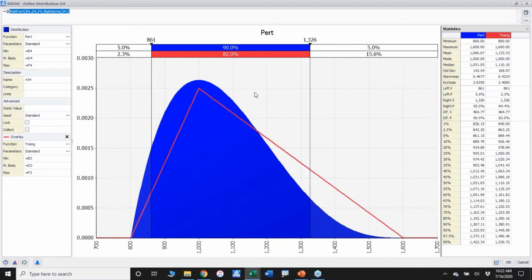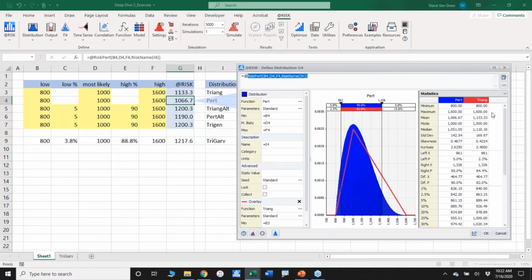And I hope I explained that well, because to me, this is really a fundamental difference between the two distributions. Choosing the PERT over the triangular tells the expert, I believe you, I'm going to put more probability around the most likely, and I'm also not going to exaggerate one or potentially both tails, depending on whether it's skewed one way or the other, or even symmetric. Okay? So that's the biggest difference. And if you've never been exposed to the PERT before, I really would encourage you to look a little bit more into it. Okay, so I'll shrink that back down.